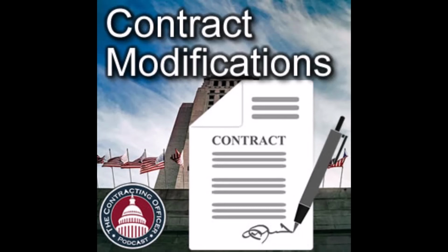Yeah, and what's interesting is sometimes I would lump some of these changes together into one mod, thinking that I was going to get like 4 or 5 things done at once. Well, that increased the value of the mod, which then increased the complexity on the other side. And the approval levels, right? You just took something simple that could have gotten done between you and your counterpart, and now it's got to be reviewed by everybody that works in the entire company.